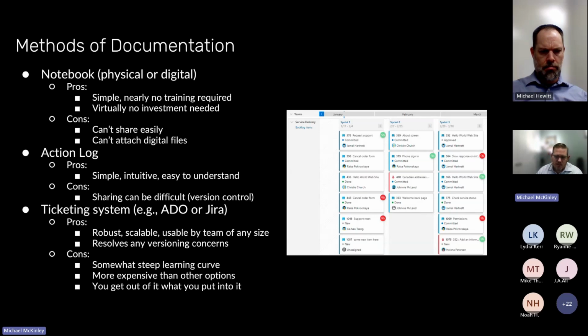You can do things like sprint planning. You can do burn down, where you could say this sprint is going to be 4 weeks long. So that's 40 hours a week times 4, 160 hours per person, times 3 people. Oh, Bob's going to be on vacation these days, so let's take that capacity out. Maybe you haircut by 20% because people are going to have meetings and so forth.